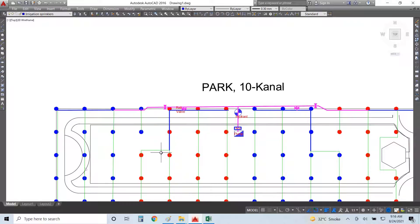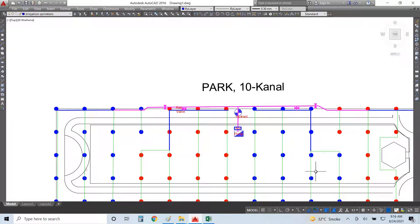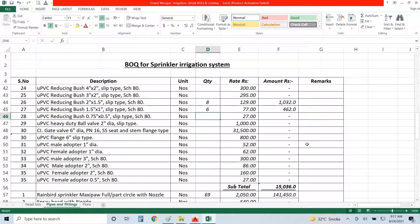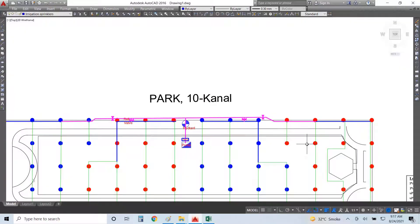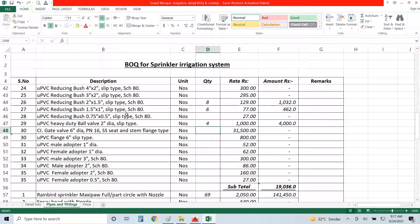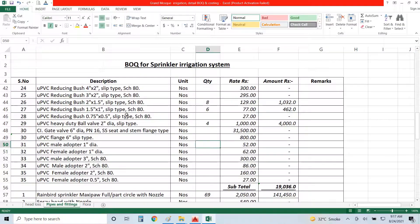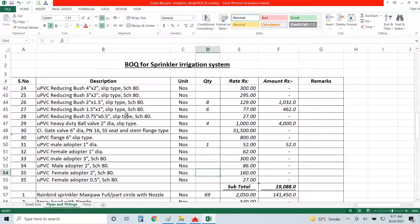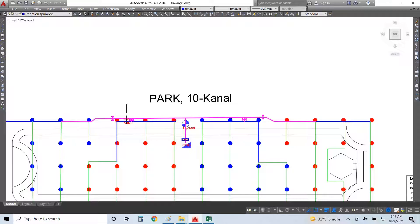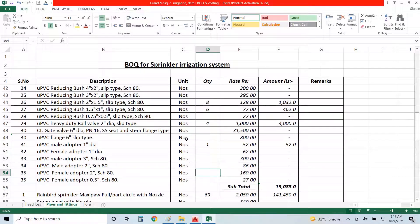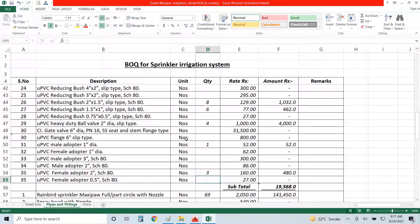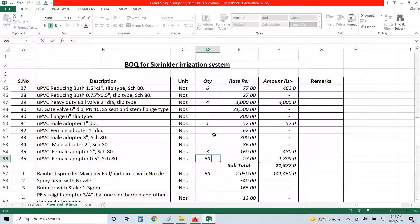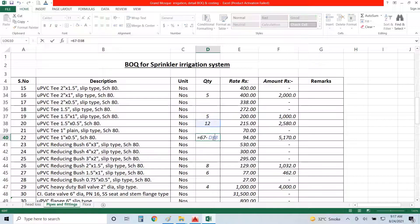Ball valve, how many of them? One, two, three, four. Four I need. Any male adapter for one-inch type, so I will need one for my hydrant. Female adapter, no I don't need it. Male adapter three-inch, male adapter two-inch, I need a female adapter, yes, for my pumping unit, so one is here required and two for pressure release valve, so I need three here. And female adapter 0.5, I need that for each sprinkler, so those are 69.